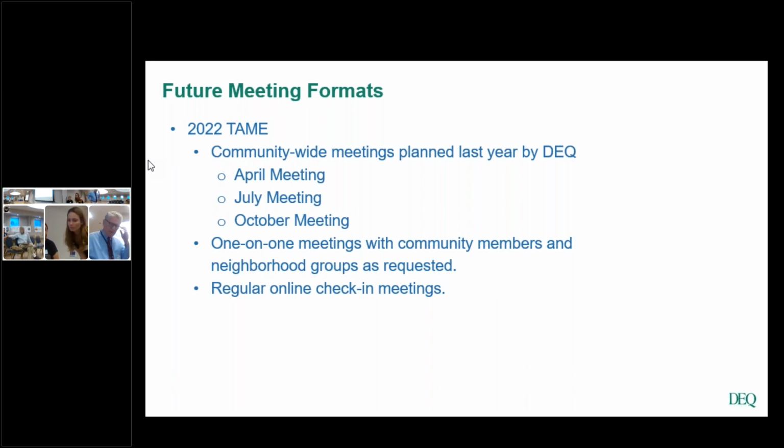Well, we're going to monitor for a minimum of 18 months at each site. In terms of installation, there's a lot of contributors to the timeline that we really have no control over. Probably the biggest one is the procurement process for the electrical contractor that we're going to have to hire to do all this. So in terms of a specific date, hard to nail that down right now, but certainly once they're installed and operating, we're going to do 18 months of sampling at each site as a minimum.